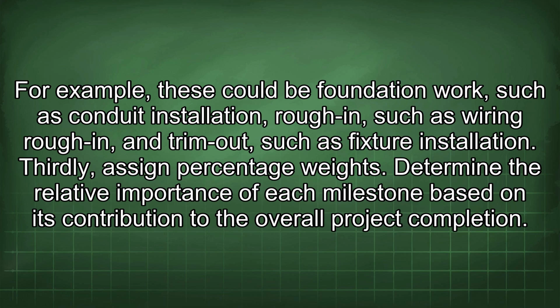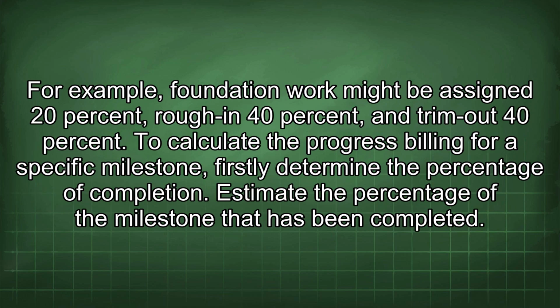Determine the relative importance of each milestone based on its contribution to the overall project completion. For example, foundation work might be assigned 20%, rough-in 40%, and trim-out 40%.